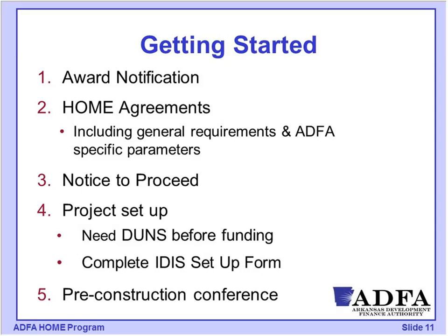Once this process has been completed, ADFA will issue to you a notice to proceed. So until that notice to proceed has been received, you're not able to begin that project. So important to know when that has been issued by ADFA. Some initial steps on getting that project set up. You will need to provide a DUNS number before funding.